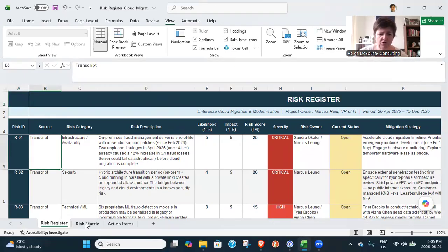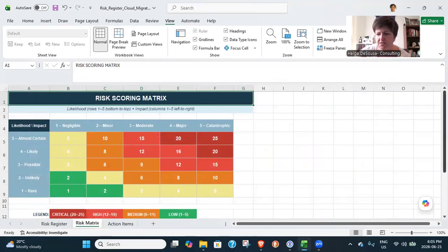Okay, now we're going to look at the risk matrix itself, the risk matrix heat map. So very, very critical, obviously, is a very solid red. Then you get into a very light red when it becomes between major and moderate, depending where it is. And then you get into yellow, where it's in progress, it's being worked on. And the pale yellow, again, it's getting close to resolution, or the risk is being monitored well, managed well.